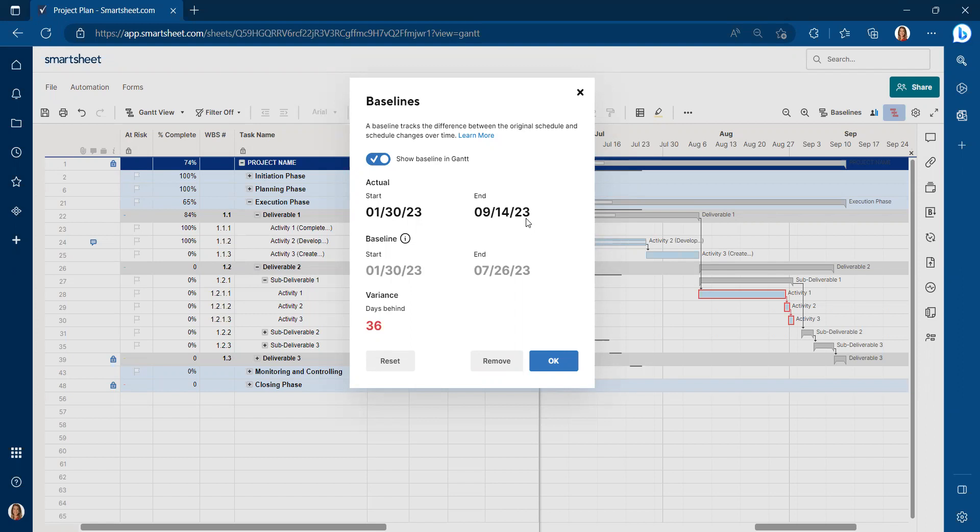Unlike MS Project, you cannot currently set multiple baselines. So let me say that again. Unlike MS Project, in Smartsheet, you cannot have multiple baselines.